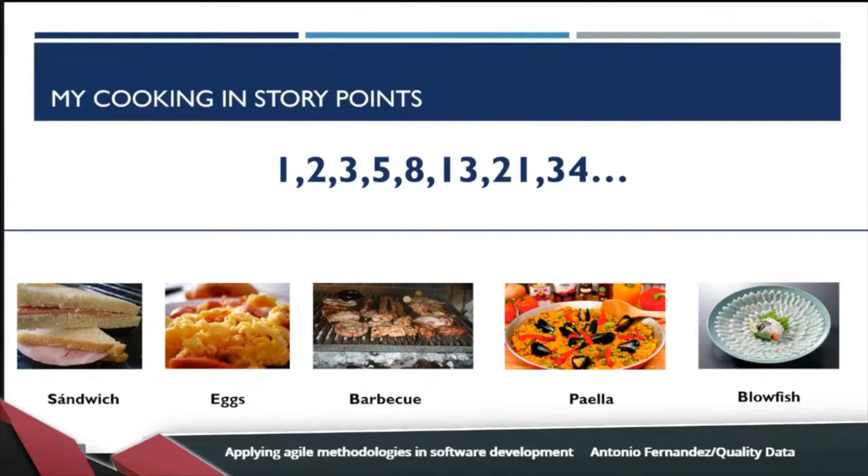I decided to put 1 story point. Immediately, this activity becomes my pivot user story, and it's the reference for future estimations.